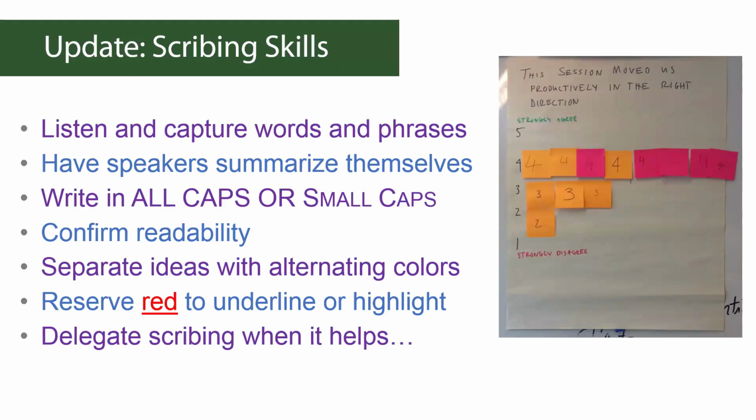You can also get a really long way as a new facilitator with something like Google Docs. If you want to do a group brainstorm, instead of writing Post-it notes and posting them on the wall, you say, okay, everybody, write this in your notepad or whatever, and then when I say go, paste it into the Google Doc, and we'll sort of affinity cluster it in there. So my recommendation is to start like that.